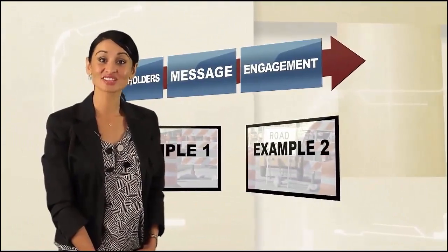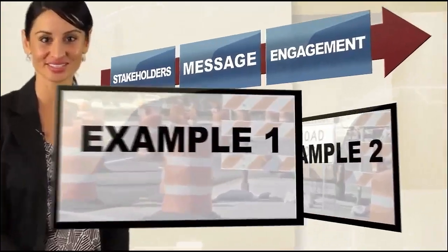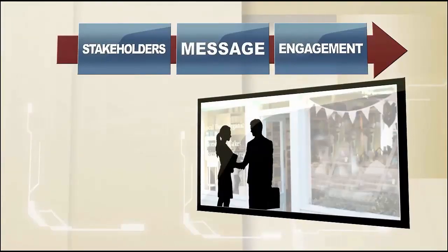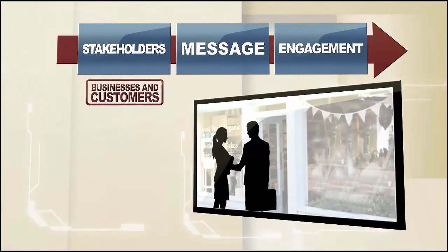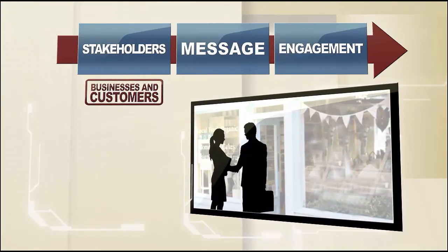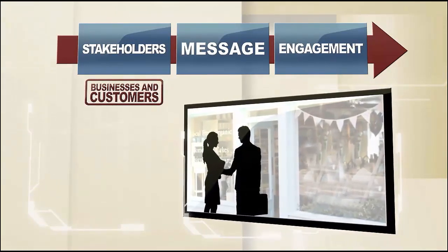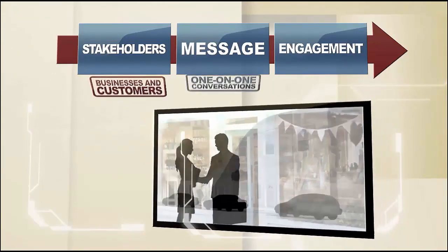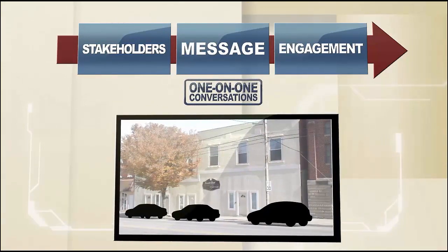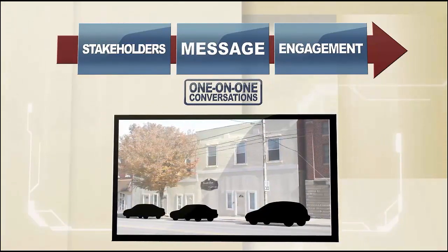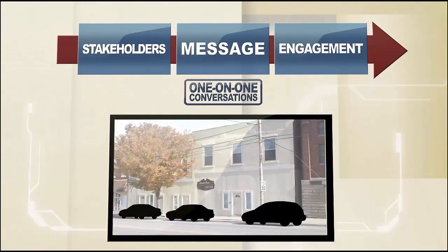To illustrate, let's look at two routine road resurfacing projects running through a business district. In our first project, the project manager visits the business district and talks with business owners, their customers, and anyone else who appears to be interested in the project. Everyone she meets is pleased that the road will be resurfaced soon. She also learns that customers rely heavily upon the on-street parking to access the street's businesses. Eliminating it, even for one day, would seriously hurt sales for all the businesses.